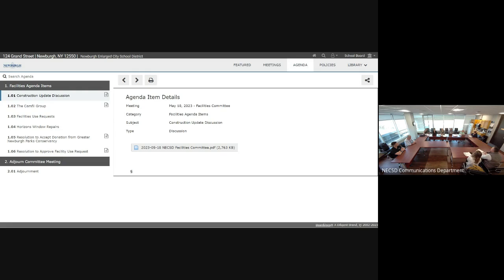Do you have an update on the HVAC delivery dates for Vales Gate? We do. Fortunately, we did have an issue at one time with RTU4, which is the one on the new addition. The contractor has just sent us a new updated version of it. Looks like everything will be here on time. And I know the district has requested the buildings be turned back over by August 18th. Is that in the schedule? That is in the schedule, and that is our goal, yes.